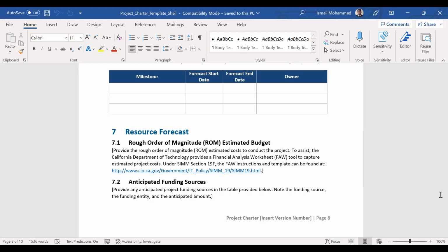Let's say, for example, the entire project you are going to complete in five iterations, and one iteration will have a number of sprints. Each sprint carries two weeks. In one iteration, I will be having four sprints. So, okay, my iteration one is complete, release my payment.